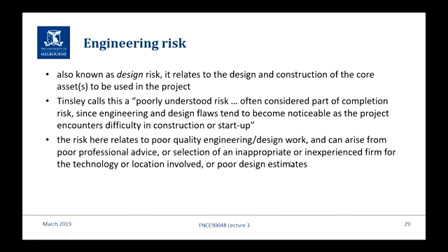So the risk here, the engineering risk, is that you've got poor quality engineering or design work. And how can you get poor quality? Typically just poor professional advice, and the example I just gave is pretty poor if you don't marry up each of the elements of the process. But it might be because you get an inappropriate or inexperienced firm for the technology or the location. So you might have a firm that's really good at this particular technology, but because of the extra demands of the location you're going to, and they're not aware of it, they could not adjust the technical design to meet the physical requirements of the new location.